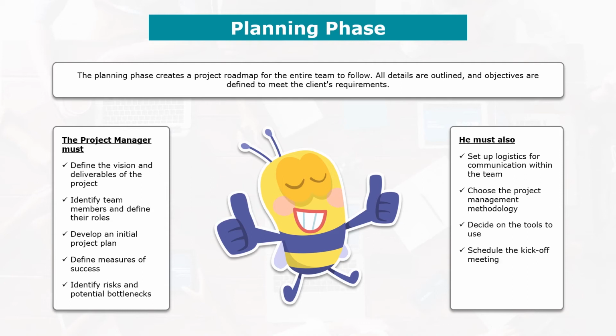And then finally, he will have to schedule the kickoff meeting. The whole project team and stakeholders must be present at that meeting, even by phone or via video conference. You will have to set up the agenda and prepare the slides for the kickoff meeting. So these slides, you will have to send them before the meeting so that everyone can prepare, and give everyone the slides after the meeting for reference purposes.